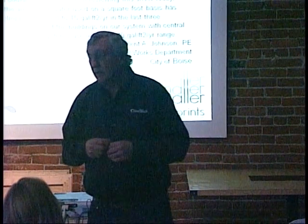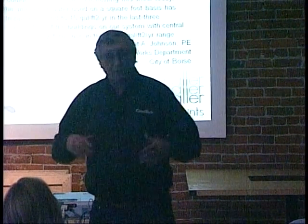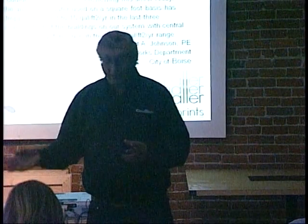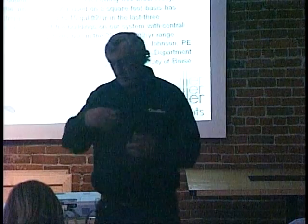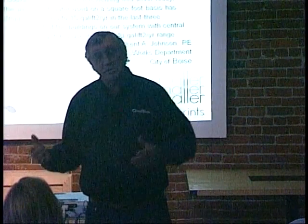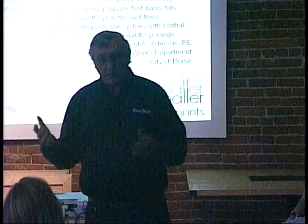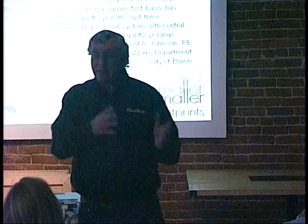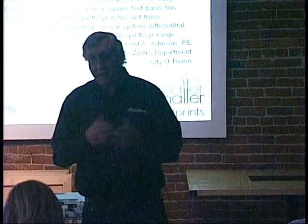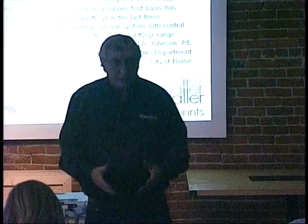We were getting ready to bid Eagle High School, and I'm going through it just about a week before it bids. I was talking to a friend of mine who was a boiler inspector, and we're looking at the plans, and he said, what kind of boilers got in there? I was flipping back, and I said, oh my God. The boilers were at least four times bigger than they should have been. The engineer was not familiar with sizing boilers for closed loop water to air heat pump systems. We got a hold of him, talked to him, got an addendum out, dropped the size of the boiler, and that works.